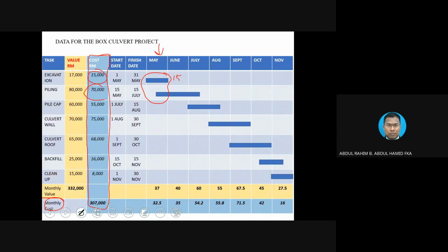And then notice that 70 is for the whole bar, but 1/4 of it would be I think 17.5. When you add those amounts, you are going to get 32.5. And this one is half of those lengths, half of 70 would be 35. This is how you calculate. When you do this, you add up this amount, is it the same as this one?